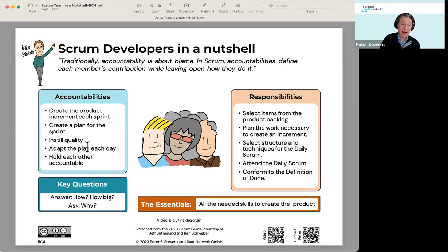And this is some kind of business goal. And then we have to figure out, well, first, what backlog items are we going to implement? And do we think we can implement them by the end of the sprint? So that's called creating the forecast. And then as we actually get into the sprint and doing the work, every day, the first thing that happens is the developers get together and figure out, what are we going to do today? How are we going to achieve the sprint goal?